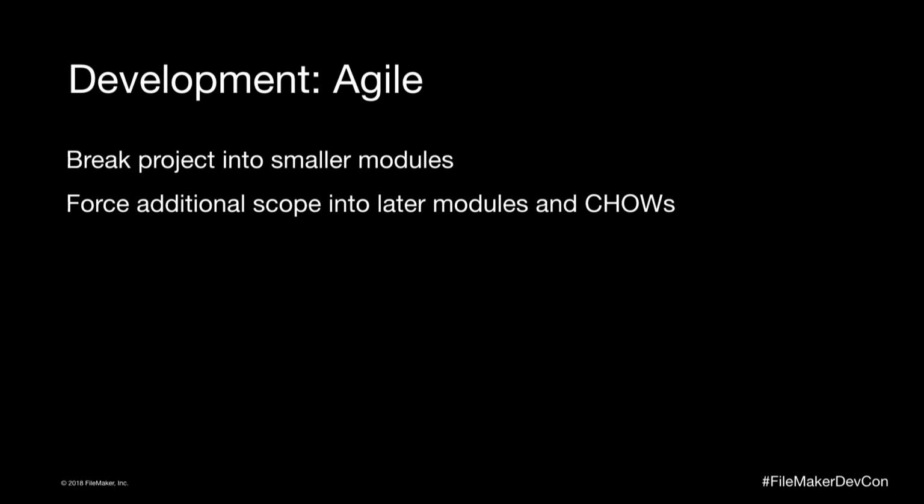The other benefit is that you have some change control with this as well. Any additional scope creep that comes up with your project, because we all know there's scope creep, whether you're dealing with a client or you're in-house, there are always additional requirements that somebody wants and additional functionalities that pop up. This allows you to push them into later modules, because you already have your roadmap, your requirements, and what you've decided and agreed upon with whoever you're working with. As you're building and being agile in your iterations, you just take any additional requirements and move them into a later module that you're going to iterate on later.